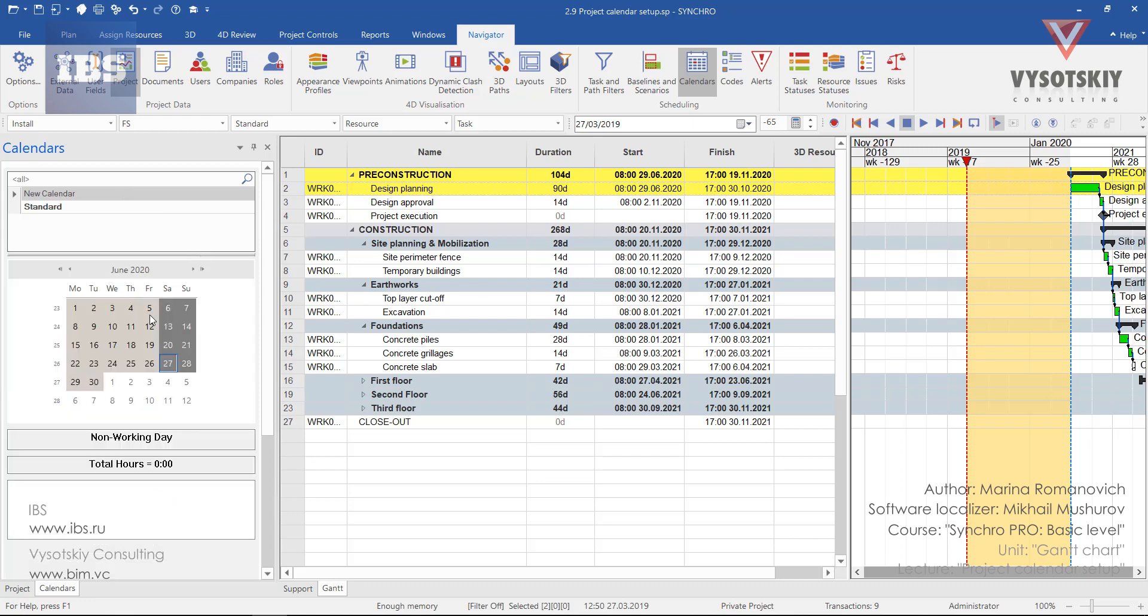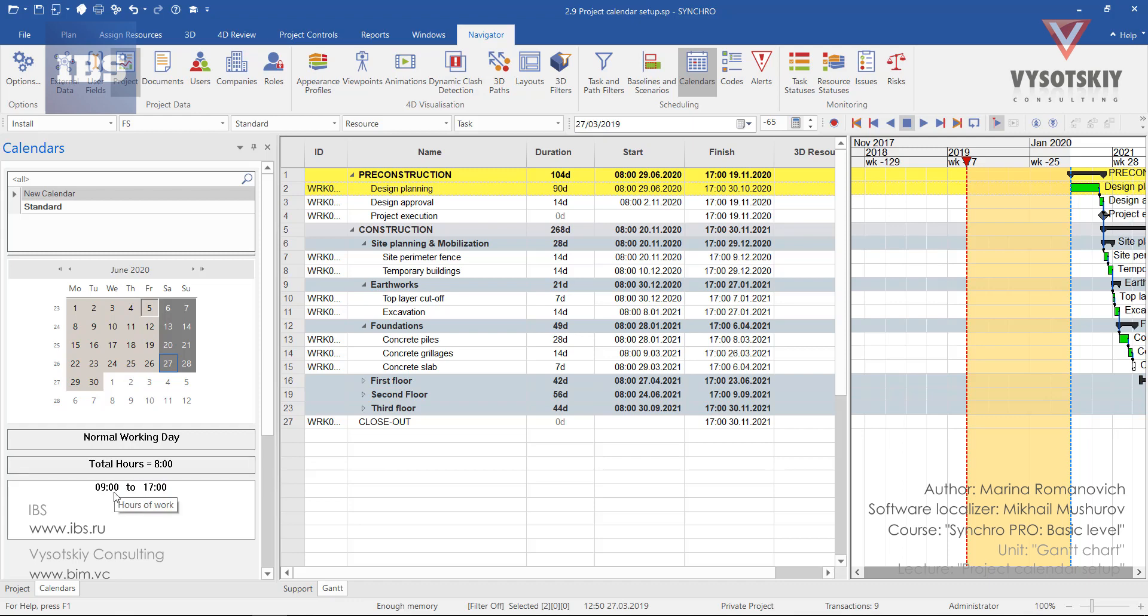As you can see below, we have five working days from Monday to Friday, inclusively. And normal shift is eight hours from 9 to 5 p.m.